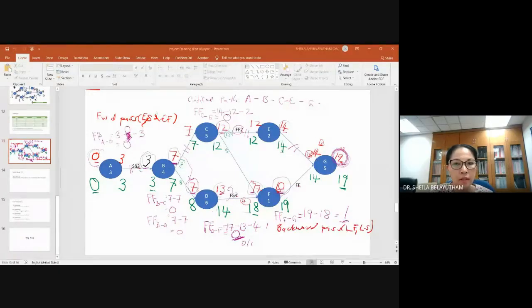Right, so I was here talking about the total float. Total float is the amount of time, the duration each activity could be delayed before it affects the total duration. So total float is about how many days an activity could be delayed from the current finish time before it affects the total duration. If you have 0 days of delay and this activity happens to be delayed, it will cause delay to the project. You will not be able to finish within the time frame of these 19 days.